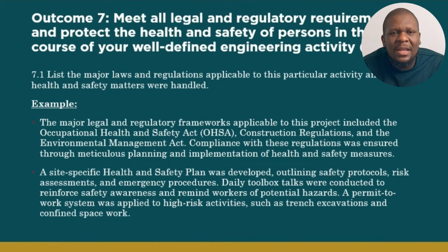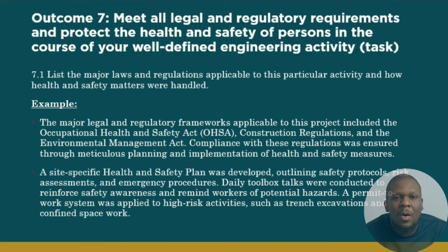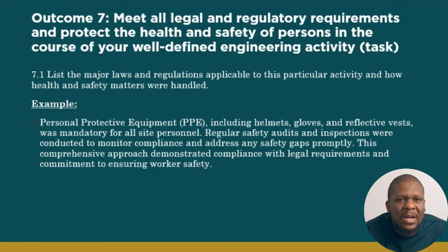And also in an event where excavation exceeds the limit of 1.5, I ensured that those excavations were shored to protect the workers on site. I ensured that all workers wore helmets, gloves, and reflective vests. And I conducted regular safety audits through the use of a safety officer.